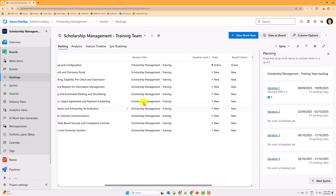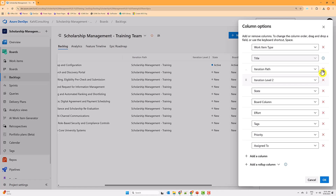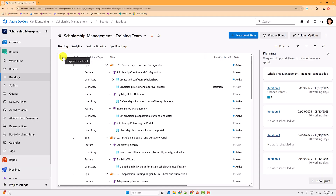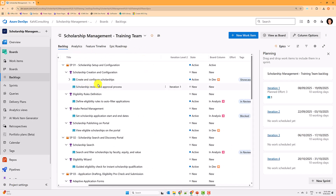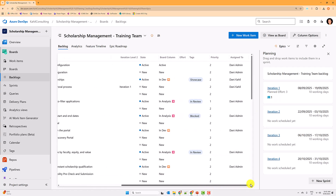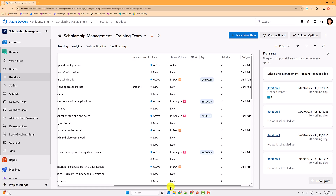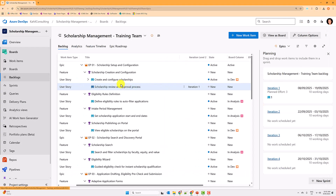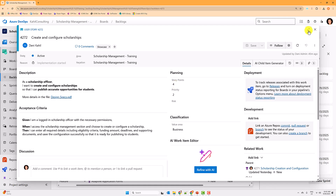Let's remove the Iteration Path column since I just need Iteration Level Two to work with. I can see that one item is assigned to Iteration One, and it shows planned work of three. That's because there are three story points — I'm not showing them in the column but they're there. Let's say this one is actually a four story point item.